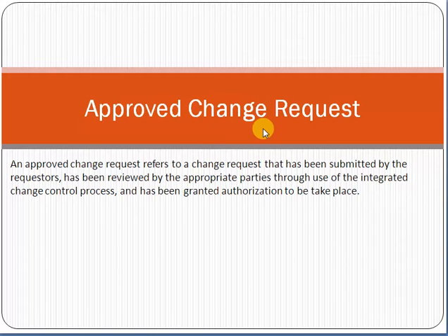Remember one thing, that it's a change request and it must be evaluated by the project manager. Evaluation means impact on time, cost, and scope as well. So now